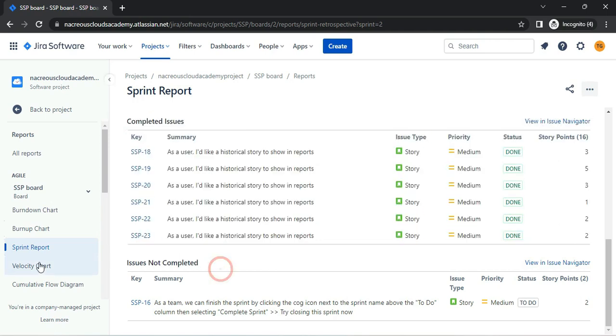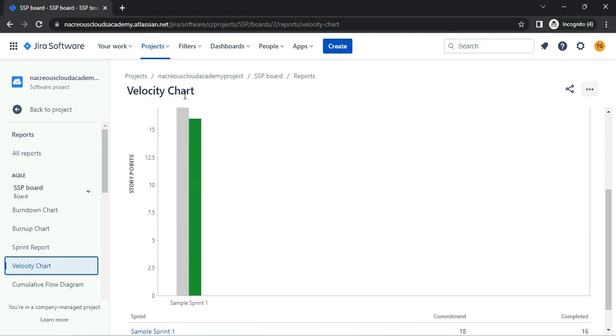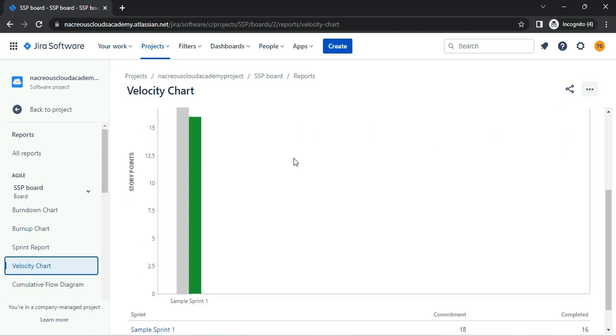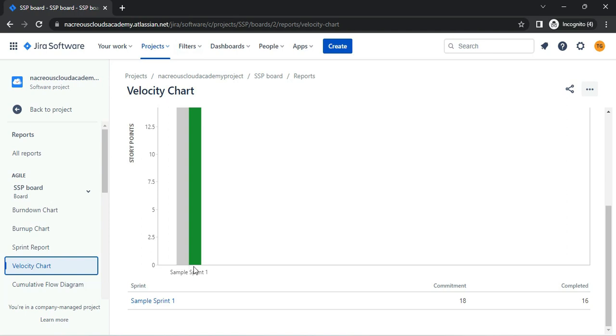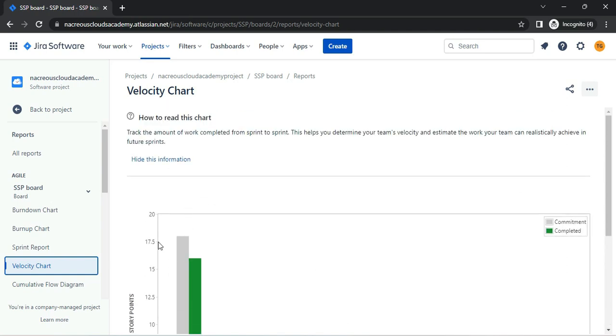Next is sprint velocity, which is nothing but a team's capacity to complete a number of story points within the sprint. This can be set for a team after monitoring the progress of the team's performance during the initial sprints. Once we have a number of stories that the team can achieve, the Product Owner and Scrum Master will then do sprint planning for that many story points in the subsequent sprints.